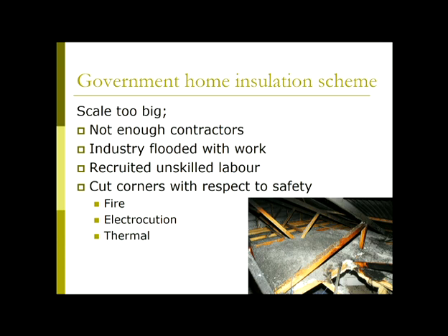All of those people who were already in the industry were trying to gear up to maximise the benefit that they would get, the amount of money that they could earn. So they were doing things like recruiting unskilled labour, putting people to work before they had any experience, putting them in charge of jobs when they didn't have any experience. And all sorts of corners started being cut with respect to safety. A lot of it was to do with lack of experience of the people who were involved, and a lot of it was to do with just trying to get as many jobs done as quickly as possible.